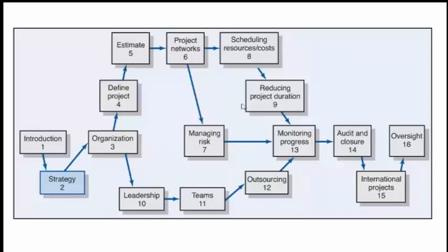So once you do risk analysis, you identify your top risks. Say for example you do brainstorming or look at projects which have been done in the past. From there you can identify the risks, then give some weightages to the risk based on the probability of occurrence, and once it occurs, what is the impact on the project. Based on the probability and the impact, you come up with the risk priority number. Higher the risk priority number, those risks you need to do a risk mitigation strategy.